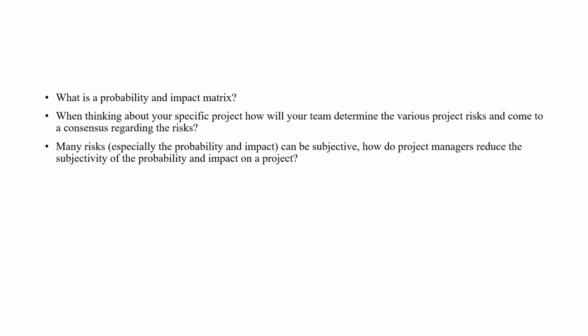The other one is analyzing the findings from the activities using probability and impact metrics to provide a risk score, and using expert judgment can be vital. And the other one is intervention with the risk of high likelihood and high impact in the first place, like we discussed in the earlier slide.